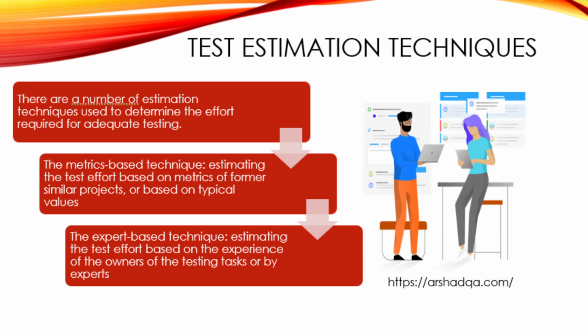So test estimation. When we talk about estimation techniques, there are a number of estimation techniques used to determine the effort required for adequate testing. One is metric based testing. In the metric based testing, we estimate the test effort based on metrics of former similar projects, or based upon typical values. In the expert based techniques, we estimate the test effort based upon the experience of the owner of the testing task, or by an expert.